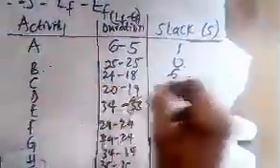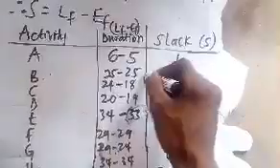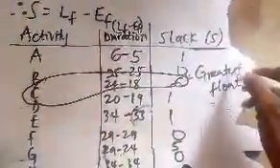My A has slack 1, my B has slack 0, my C slack 6. So you can see the greatest float occurs at my C. Permit me for circling like that, I'm looking through the camera. Okay, so this is where the greatest float occurs. So if they ask what is the total float, the total float or total slack, or you can say greatest float or slack.